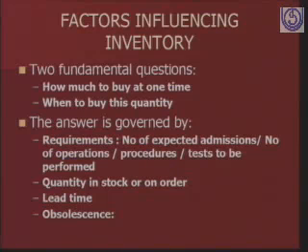Then your lead time. I hope you understand this word lead time. Lead time is the time which you require from when you are raising that indent or raising that procurement to actually getting the supply. That means when you are planning to have those stock in your store, that time gap is known as lead time.